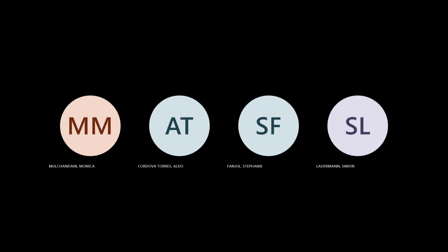So these are the various departments. It flows from one department to another. They do their work and they hand it over. Then there's another thing, the status of a project. Status is a summarized reflection of where the project stands. If you see the schedule, you can decipher where the project stands also, but without looking at the schedule and just looking at the status attribute, we can know where the project stands.